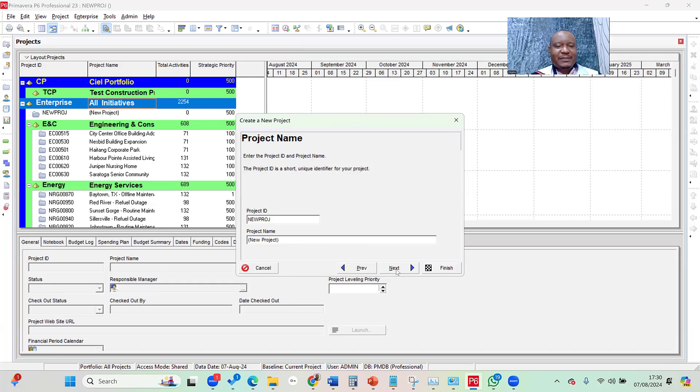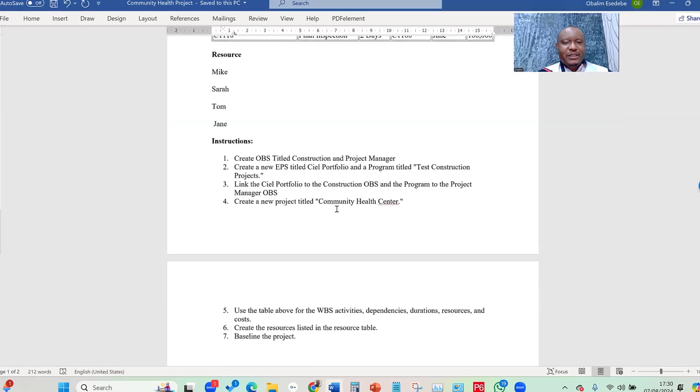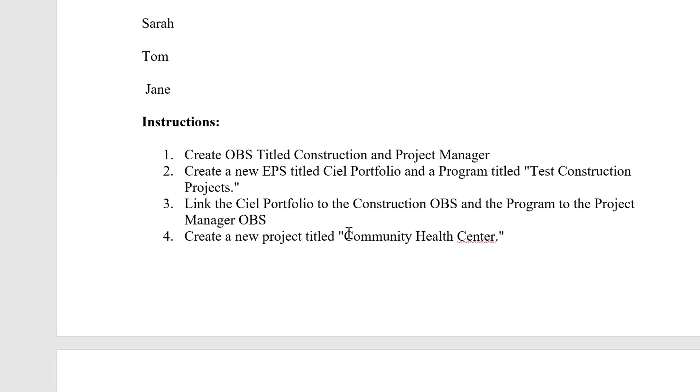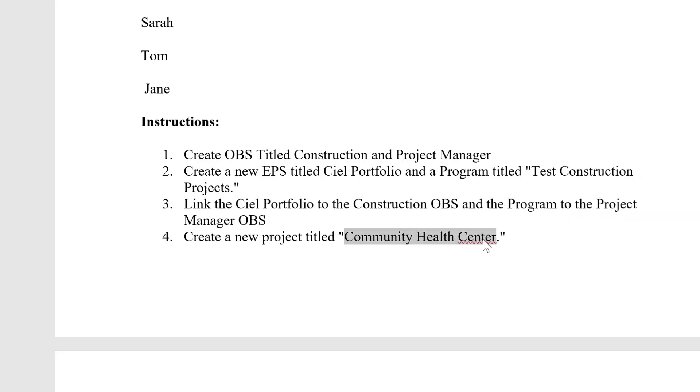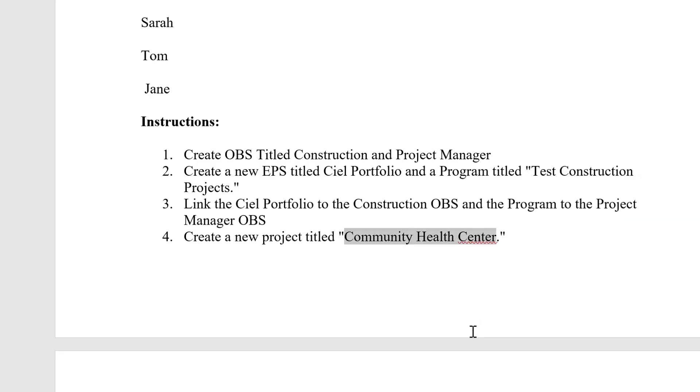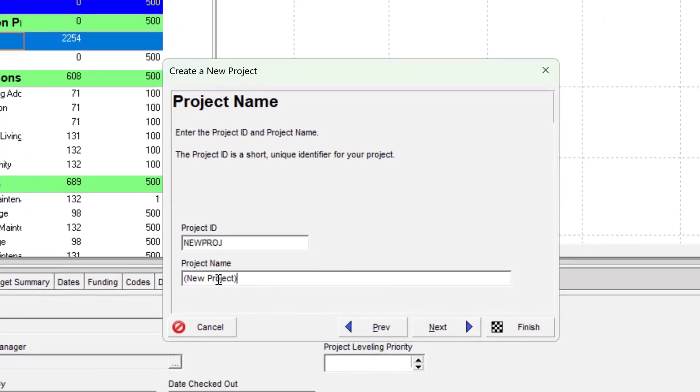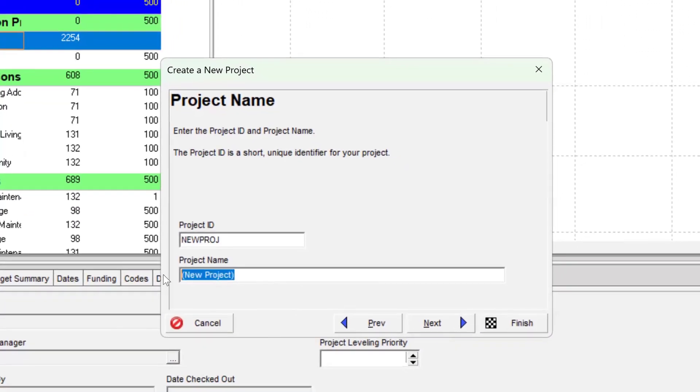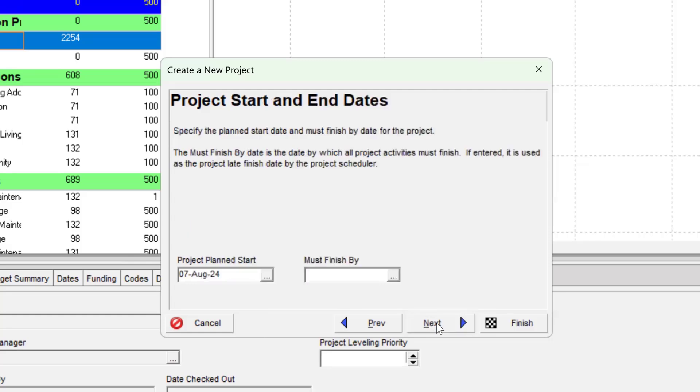The next thing it asks me is the project ID. I want to jump into the brief real quick to know if an ID was provided. Otherwise, we just use the initials as the project ID. So the initials was not provided, only the project title, which is okay. I copied the project title, which is Community Health Center, and I jump into my Primavera P6. So under the project name, I paste the Community Health Center as the project name, and then I can use the CHC as the ID. And then once I've done that, I click on next.